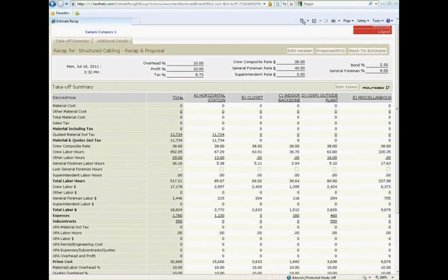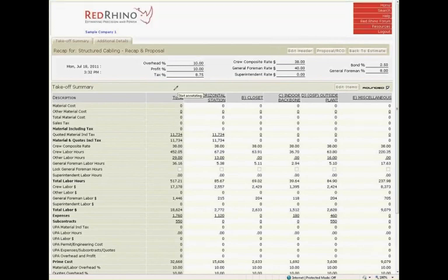Now below the top header is a Takeoff Summary, which displays the total column and the names of the sections to the right. In this estimate, the section names you can see are horizontal, closets, indoor backbone, riser, and so on. The total column displays the total values from all sections combined. In Part 1 and Part 2 videos, we input materials in each section. The values seen in the recap here are a result of that input.